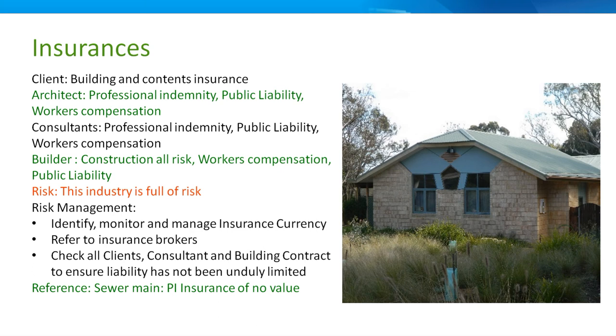Can I just ask you, the Dial Before You Dig, it wouldn't have shown up on something like that? We got 3 lines on Dial Before You Dig, but they're not locational necessarily. Because there's 3 lines, we sent that to the consultants. What are these? Oh, it's fine, there's only 2, don't know what the other one is. Well, we know what the other one was now. Dial Before You Dig, look at it all, but scrutinise it.